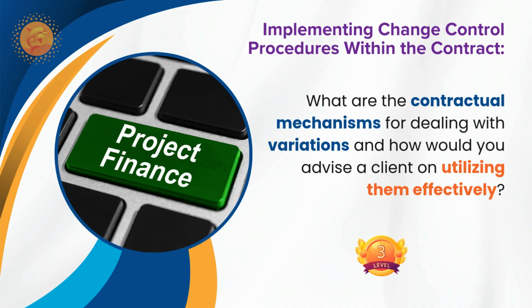But if at all any of the parties become aware of a variation or change occurring to the project, they have to notify. That's all. It will be defined within your contracts. You can add additional clauses if at all required. I checked, no timeline is there in FIDIC 1997. It is not defined, but it should be notified.